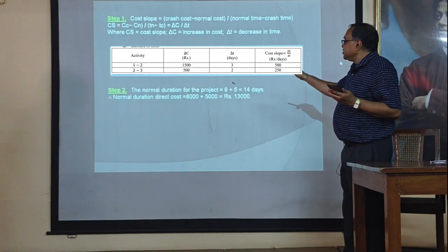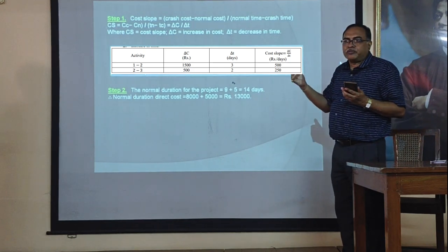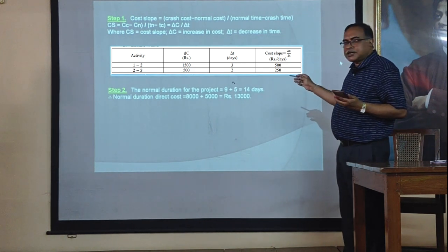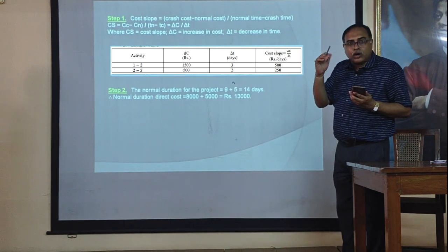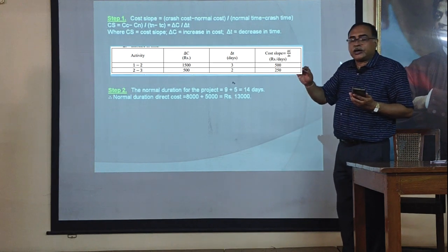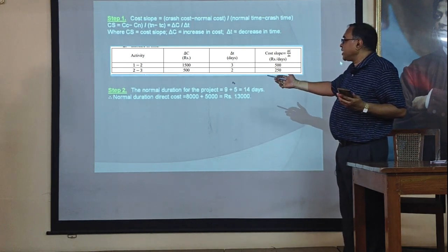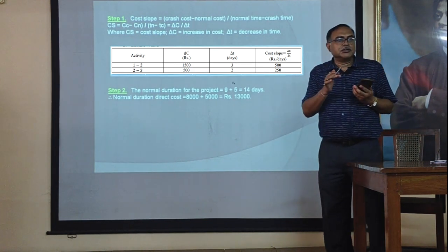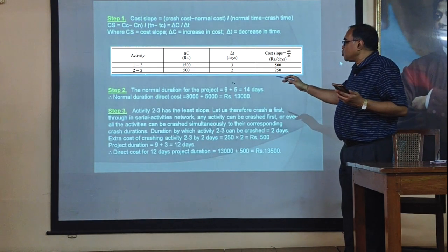Okay, the normal duration for the project should be 9 plus 5. Normal duration of the first activity is 9, and the second activity is 5. So, total normal duration for the whole project is 9 plus 5, that is 14 days, okay? And normal direct cost should be 8,000 plus 5,000, that is 13,000. Clear? Next step. Then, activity 2, 3